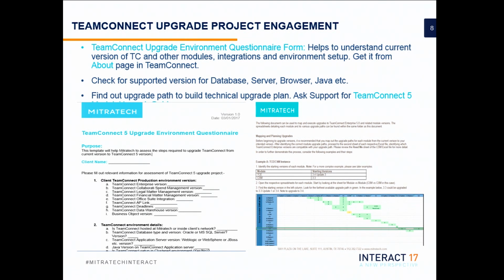Because I can tell you, if you don't take the right upgrade path, you will go to the TeamConnect 5 upgrade, but you will not be able to upgrade your other modules. And the only option is to roll back your TeamConnect database and then redo the upgrade. That's really a painful process, where you spend a lot of time and then you have to roll back and redo everything.